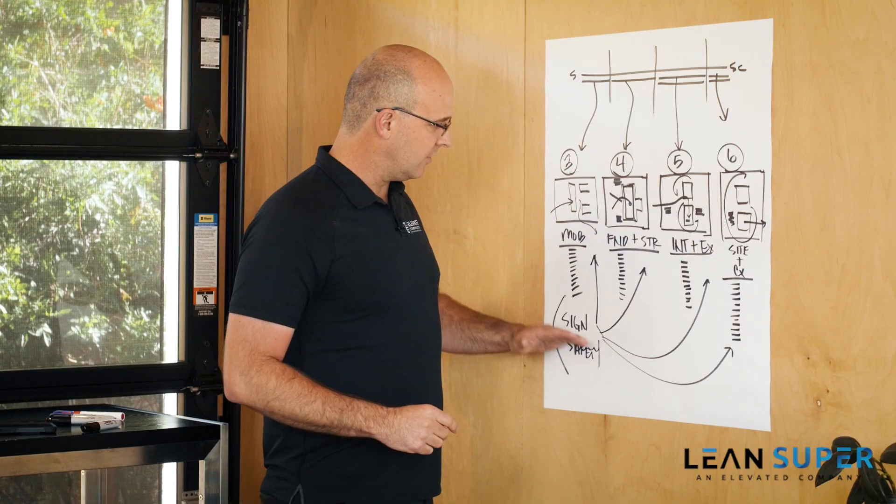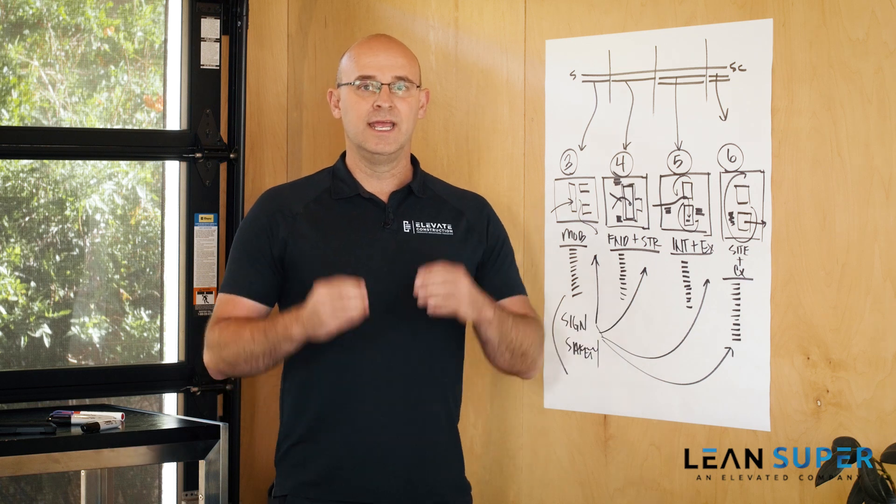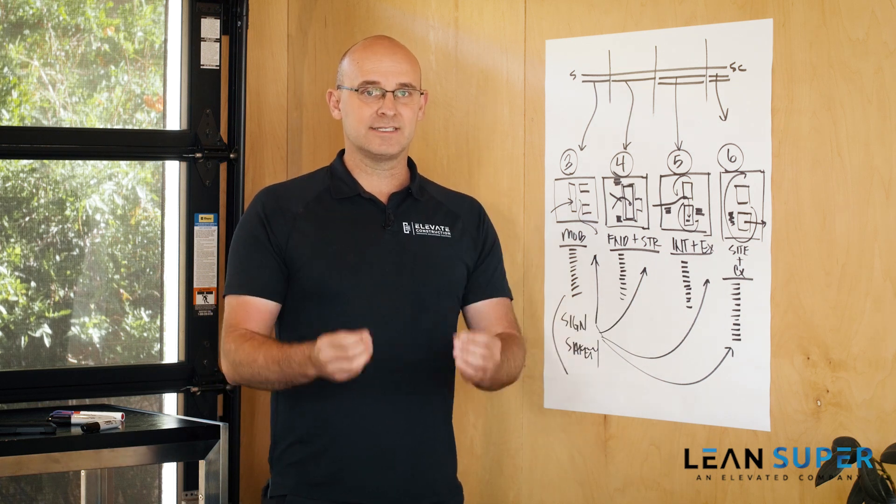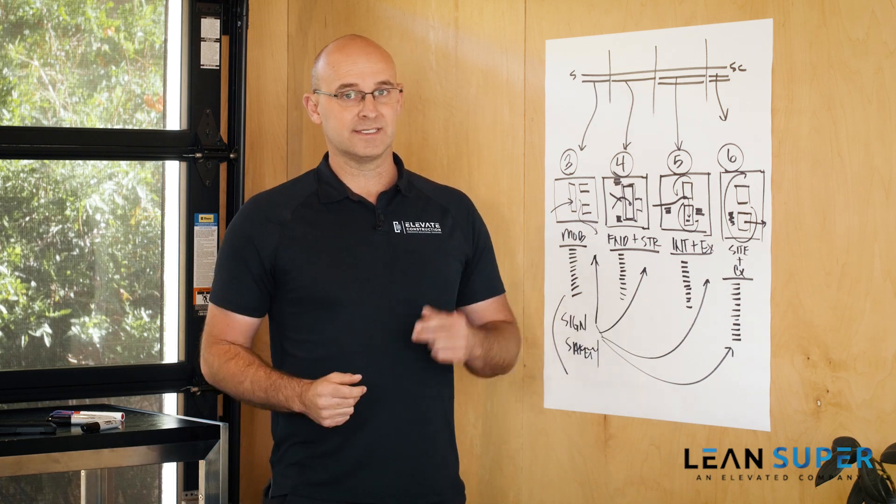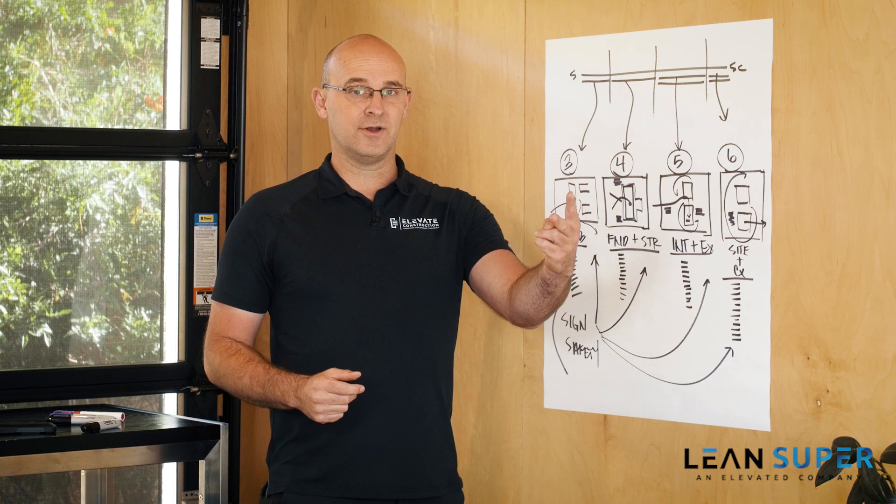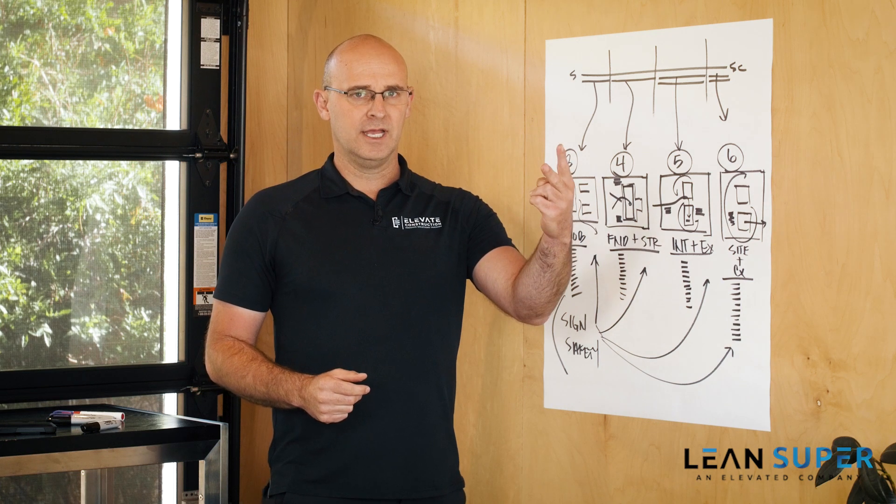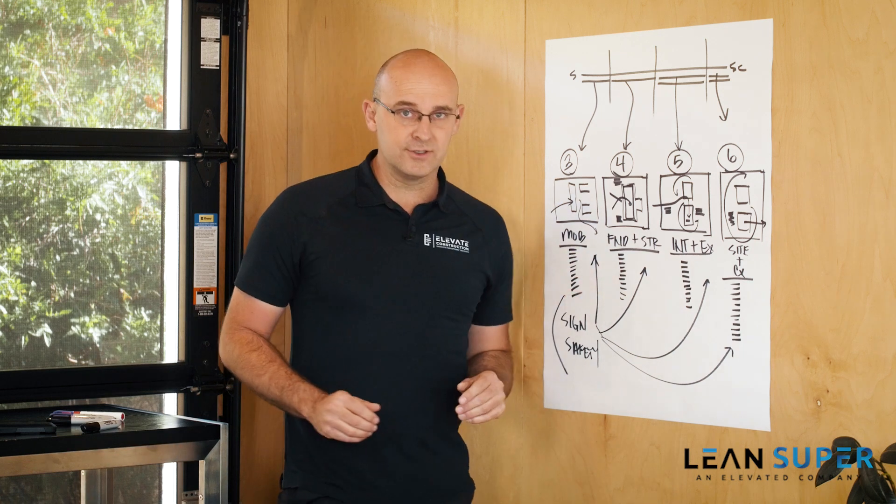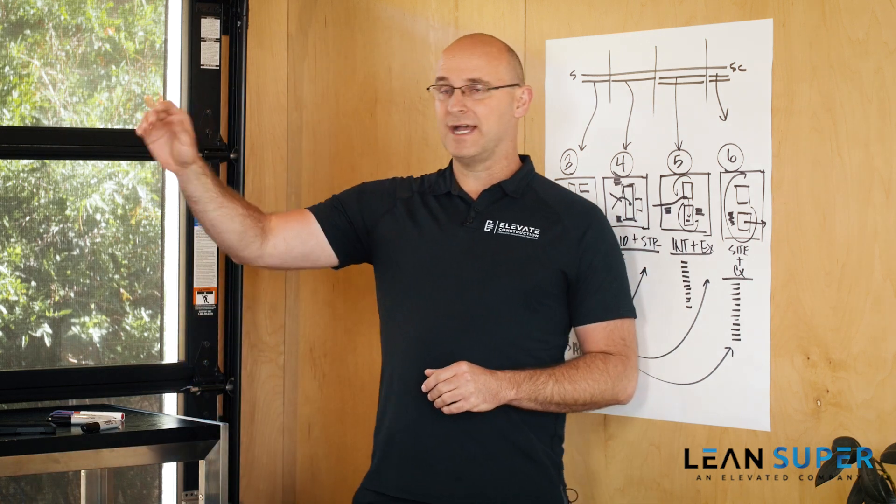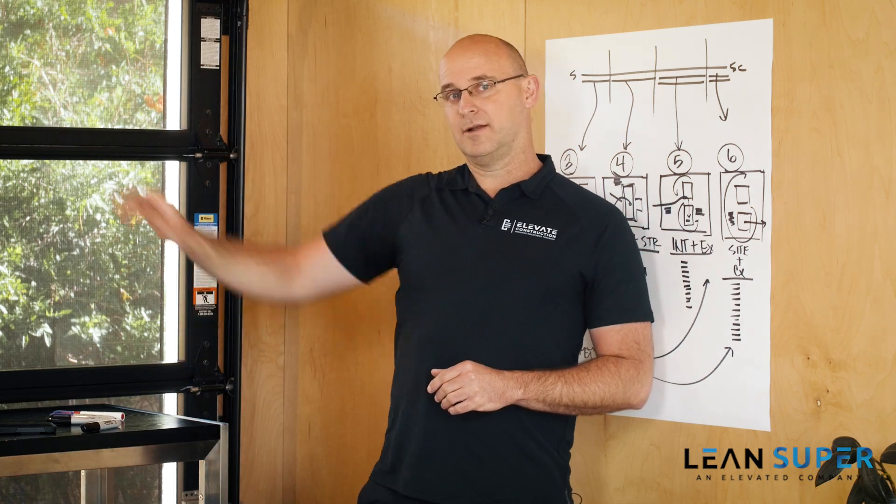You can't do that if you have one drawing that's old and not updated. You've got to have current drawings that have all the right relevant information in an active system that you use daily that Foreman can see and that your crane operator, forklift operator, and hoist operator can follow. So these are actual drawings that are used on the site. They are not passive, old, out of date, and up on the wall.